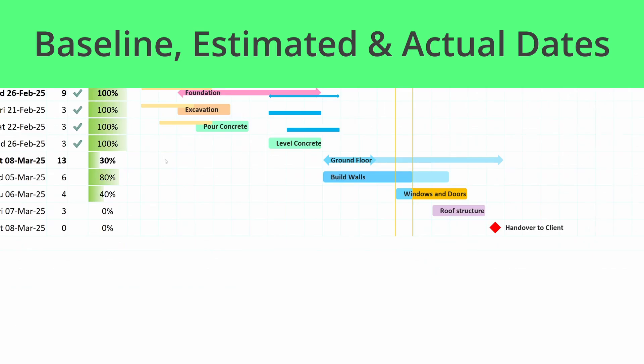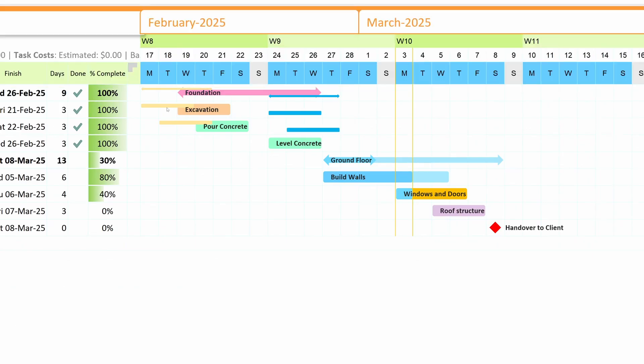Baseline, estimated, and actual dates. Compare planned vs actual progress by tracking baseline, estimated, and actual dates in your timeline. This helps you spot delays early and make necessary adjustments.